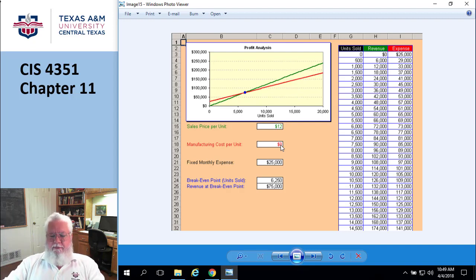Okay, so risk avoidance. Acceptance. Risk acceptance basically means, hell, let's just let it happen. In other words, it's going to cost me way too much money to make that risk go away, and the likelihood is low and the impact is low, so what the heck? I'll document it. I'm not going to say, I don't know anything about that. No, you're going to document it, but you're also going to say, I'm not planning on doing it. The cost of managing the risk is greater than the risk itself. Okay.